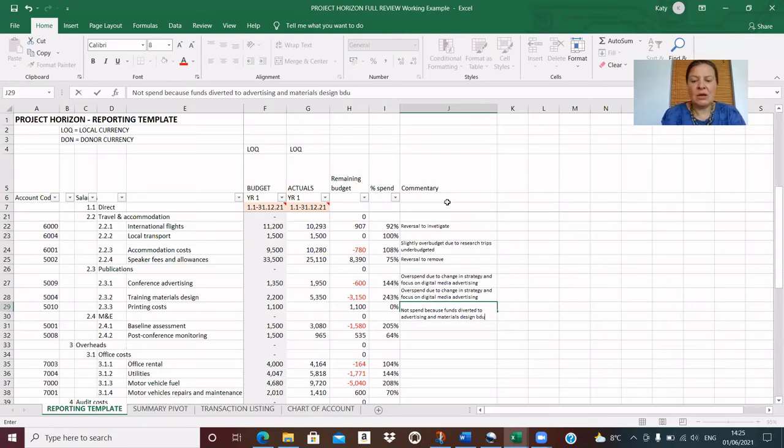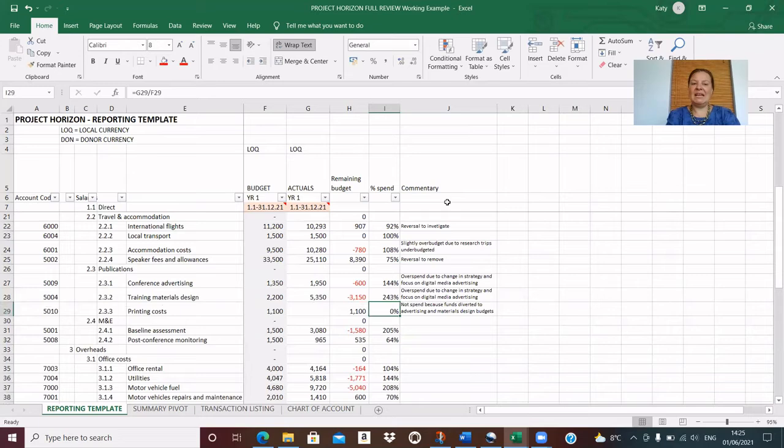Now, as long as we come in within our 10% band by the activities, we don't necessarily need to do huge reallocations to take costs from these two lines and reallocate them here. So before we get ourselves into a tizzy, thinking we must reallocate, let's see how we would end up on the 10% benchmarks, because we run the risk of making errors with reversals, typing errors, etc., if we start reallocating when we don't need to.